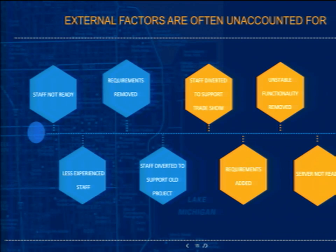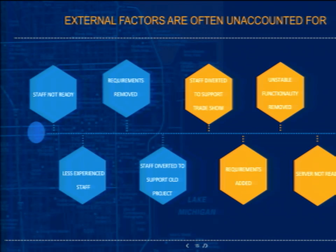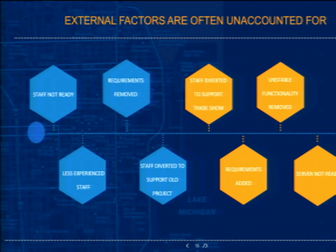How many times have you layered two projects back to back and had to skimp on one because you keep going back to support efforts in another? Later in the project, staff gets diverted to a trade show. All of your projects are experiencing this right now, and I bet it wasn't in the estimate. These items don't necessarily need to be passed on to the client — it's not their fault — but they need to be planned for in your timelines.